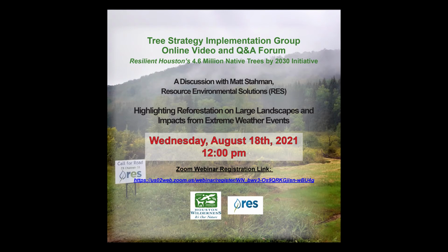Multiple success criteria for each habitat include what you would expect as far as the vegetation coverage, size of the trees, canopy coverage of the trees, composition of the trees, and then a whole litany of other things. A lot of it is geared toward about a dozen different keystone species and their habitat needs within those different habitats that we're restoring there on that particular project at Bodart. And that's typical for all of our projects that have some tie back to a mitigation component for a federal or a state permit. So we're used to seeing that.